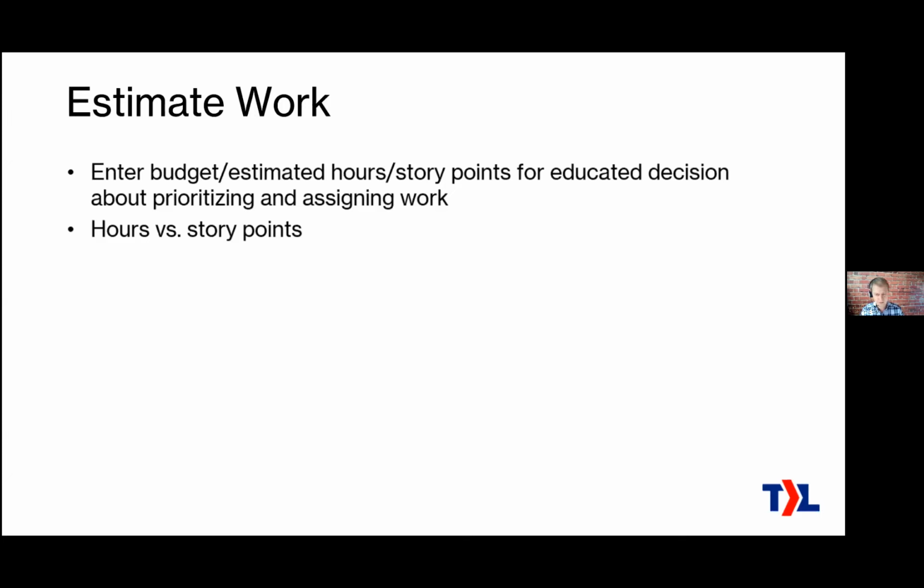And the benefit is that it doesn't matter who does the work, right? You should be able to have your team sit down and, if they understand the nature of the work for a single ticket, the team should be able to, even among junior or senior engineers, agree on the number of story points or complexity points for this work. Hey, this ticket seems to be twice as complex as this ticket.